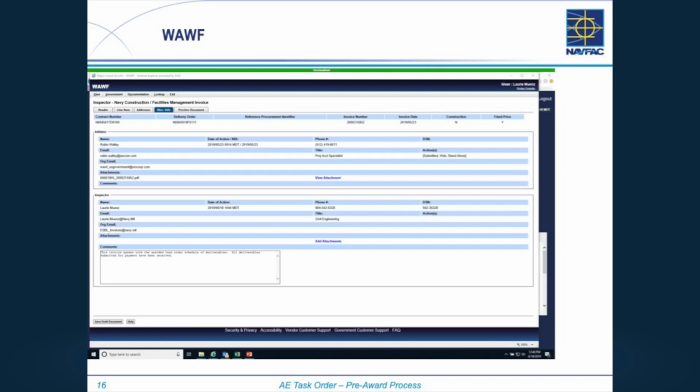If this is for the design charrette, or the 35% submittal, or something that you want to detail, you can say, invoice is for the 35% submittal. We've received it and reviewed it, it's good to go. We're moving on. We should pay for this. So you just give some sort of reason that shows, I've looked at it and it is acceptable for payment.